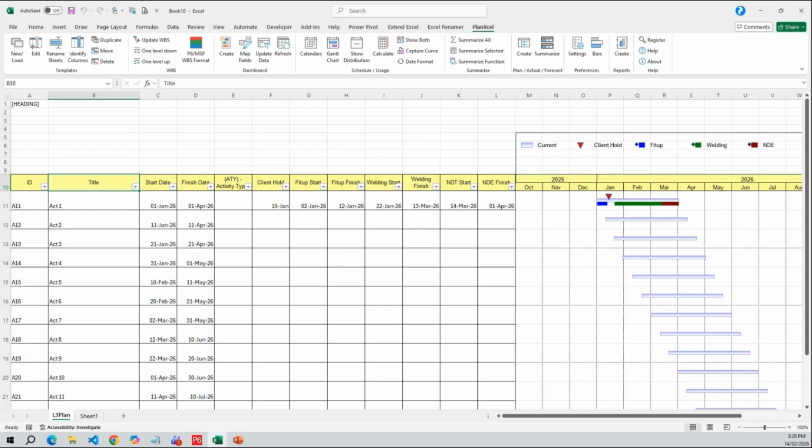Any other point? Somebody has asked how you can give relationships. Just for info, this is not scheduling software, so we can build relations based on Excel formulas. That is the only way we can give relations. And once the schedule is built with respect to the dates we want to use, then we do the further analysis. I'm not seeing any other questions.